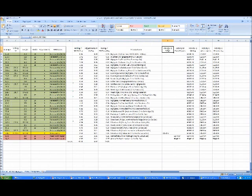And then we automatically built activity IDs for videoing for our water management department. And what we're doing here is we're really building a work breakdown structure with these as the major work groups. So these are tasks or activities that water management's going to do. These are activity IDs for point repairs, and these are the activity IDs for milling, adjustments, and resurfacing. And we built those automatically.